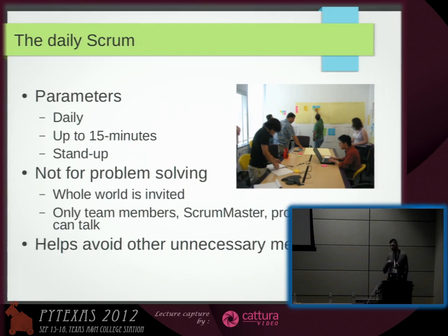As the team goes through the sprint, they have to perform daily Scrum meetings, which need to be very short. Typically, this can be done in the morning. A good tool for this is a coffee machine or coffee maker. You want your people to come there, get their coffee or whatever they're getting. You would like them to stand up, so nobody is sitting. The intention is that we don't have a meeting that's going to last long. You just want a very short and brief report.